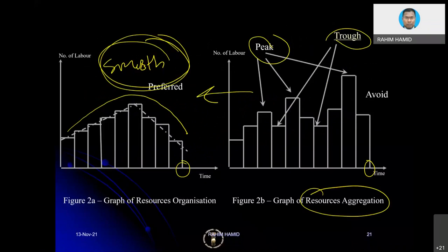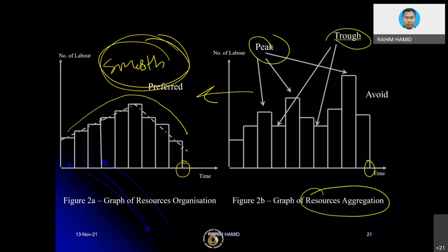And remember, why do we calculate early start, early finish, late start, and late finish? Maybe some of you still wonder why on earth we have to go through the difficulty of calculating them and get confused some more. Well, now is the application. In project scheduling, we don't have to use the early start for all activities. We can use a combination. Some activities can use the early start date, whereas others can use the late start date, if the late start and early start dates are not the same. If they are the same, for sure you cannot adjust anymore. Then another thing is that we can use in between, not really at the earliest start date, not really at the latest start date, but in between.